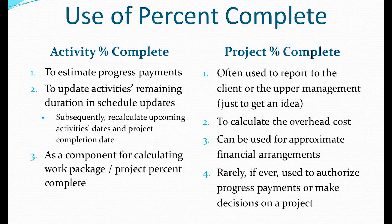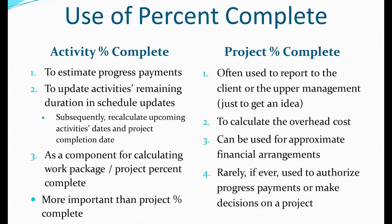Only if the nature of that project — let's say the whole project is about excavation — then yes, we can use that. In this case, the project and the activity are one thing. Of course, activity percent complete is more important because, like I said, progress payments depend on that, and not realizing the meaning or the accuracy of the percent complete that the contractor is telling you can be disastrous.